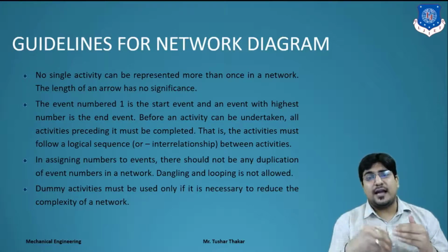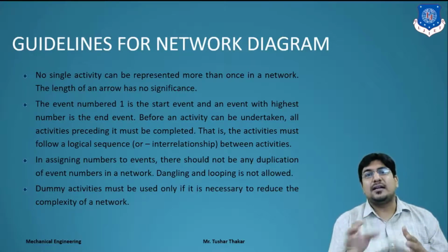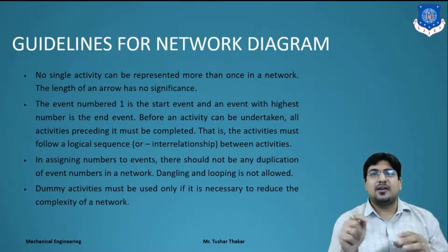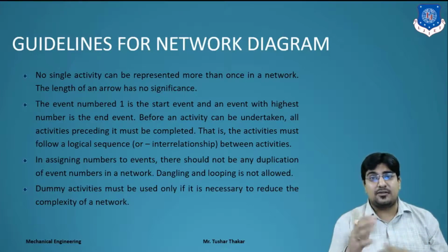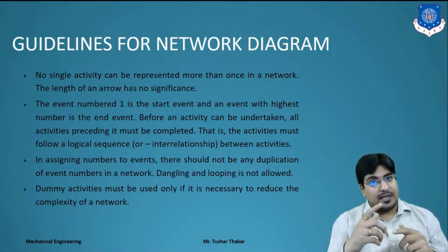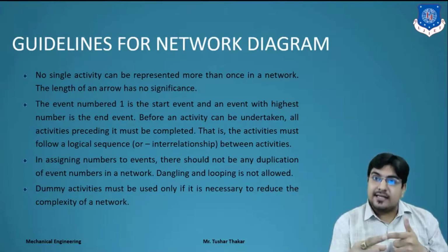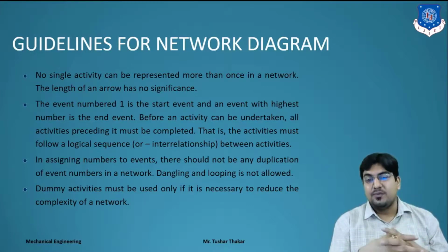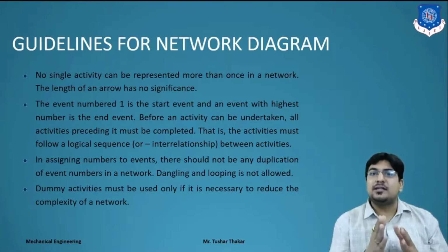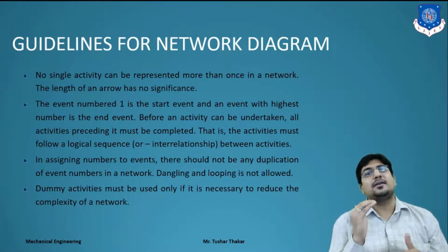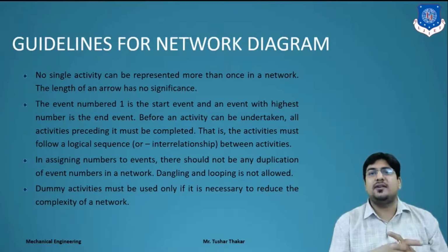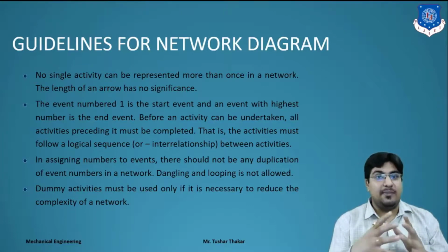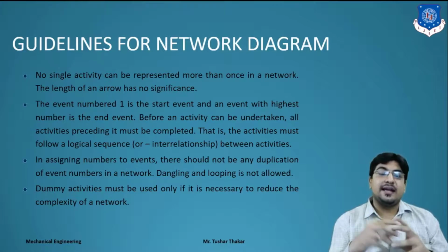Suppose we have drawn a network diagram without implying any logical sequencing or logical steps. We draw a network diagram and think that we can't complete the project, so we enter a dummy. But if we apply the network diagram in logical sequence, with the logic, we can't introduce any dummy activity. So keep in mind, we introduce a dummy activity only when a network diagram has a complexity and there is no way to draw or introduce that activity. At that time we have to use a dummy activity, which is denoted as a dotted line.